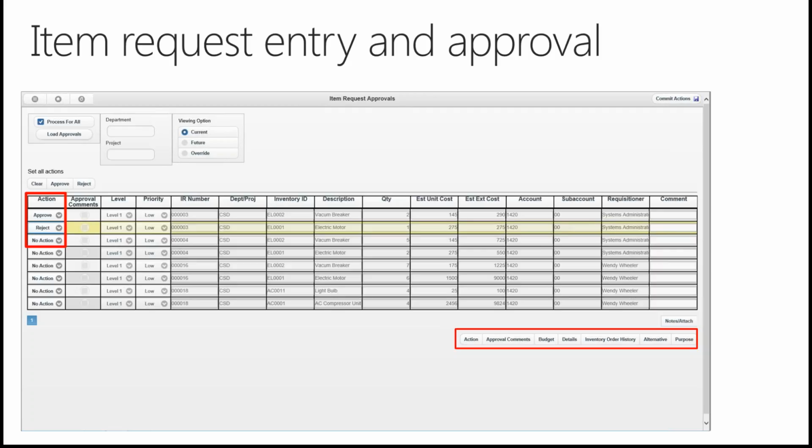Then the purchasing people gather the item requests by the type of material onto a requisition so they can create RFQs, requests for quotation, to the vendors. You can get discounted rates by having all these item requests on one requisition, because they probably come from similar vendors. So that's the logic behind the item request to requisition piece.